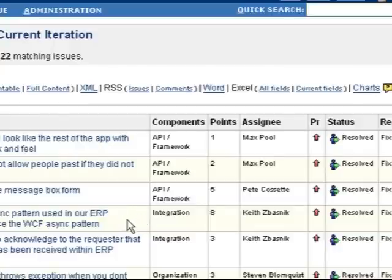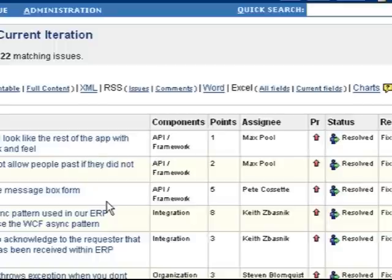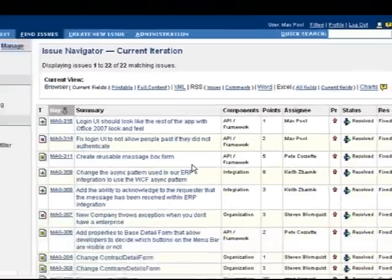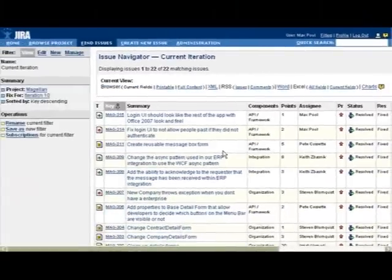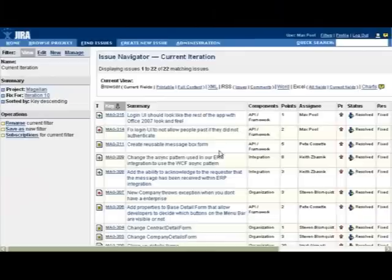If you look at the INVEST model, which is independent, negotiable, valuable, estimatable, small, and testable granularity of user stories or tasks, you know, this really can help you then say okay I have all these bugs or I have all these tasks in my system, I need a place to put my one-to-one estimation on. And so that can really help if you can put user-defined fields within your bug tracker, or perhaps your bug tracker comes with it natively.